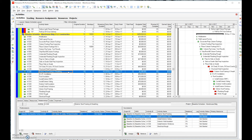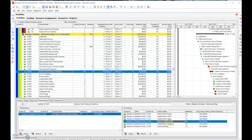Removing redundancies is all about removing unnecessary logic. We go activity by activity — if we have more than one to two predecessors or one to two successors, we go through and verify they're necessary. In removing redundancies from the project schedule, we talked about what redundancies are: unnecessary logic. We looked at an example, recognized the impact logic has, and understood the future implications. At the end of the day, removing redundancies is about removing unnecessary logic. That covers step number 13.